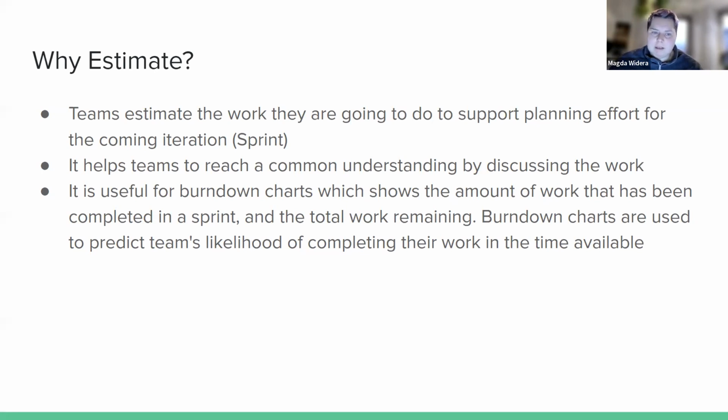So you know how we work in sprints. Our sprints are a bit different. Our sprints tend to be quite long. Normally in a work environment, they would be about 2 weeks. That's probably most common. And during those 2 weeks, you would just pull a number of those tickets, and you would want to know how big those tickets are. You don't want to work on just a few tickets that are very small, or 15 tickets that are massive. So once you know a bit more about planning, about estimating, knowing how to estimate and what goes into that supports your planning effort.